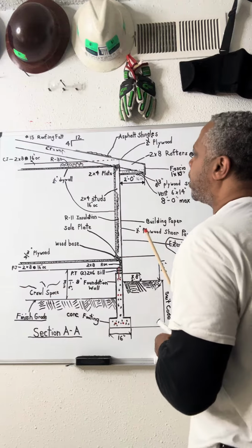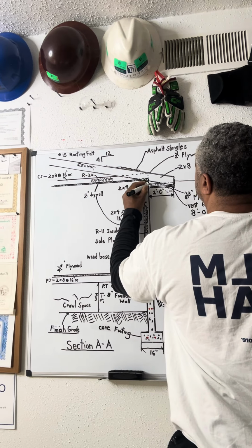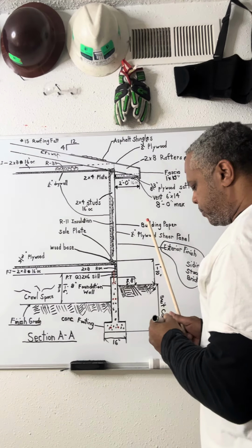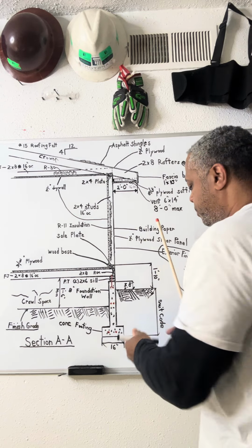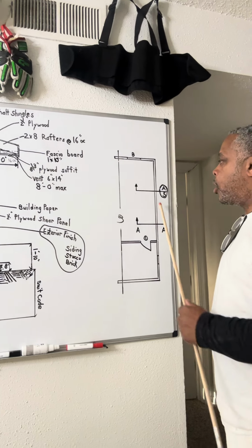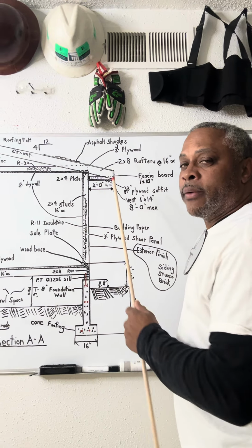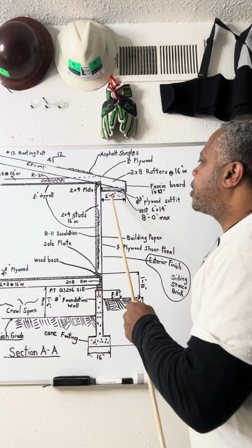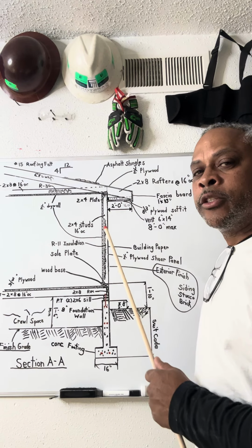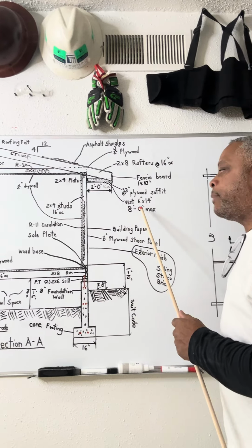Now, underneath your soffit, this area right here, you have 2x4s that are framing, attached. There usually is what we call a ledger that your 2x4s are attached to. That ledger is a 2x4 nailed against the wall, and it runs the whole length of your building, all the way up and around your soffit. You have to calculate that out of 2x4s. They're going to be spaced every 16 inches on center, at 8-foot intervals. Sometimes it can be specified as 6-foot intervals, 8 max.